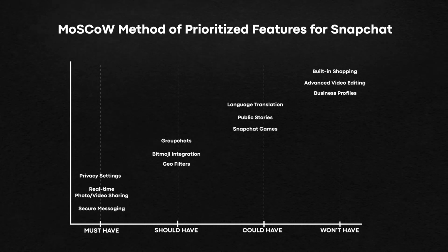For me, in the day-to-day, most of the places, in fact, all of the development agencies that I've worked with or in-house have used some sort of a pointing method, whether it's t-shirt sizing or Fibonacci. It's a good way to get a sense of difficulty. I know you're familiar with velocity, and really understanding, getting kind of a sniff test as far as how many points you can put in any given sprint. Yeah, absolutely.